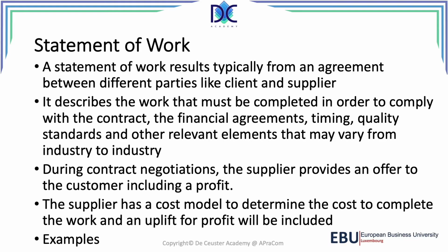Each activity had an estimated cost. So when we started working on the project, we know what was offered to the customer, we have our cost model, and we can see that the implementation goes well or not. We can evaluate how good we are doing our job, and it may also lead to the fact that we may have to change some elements.